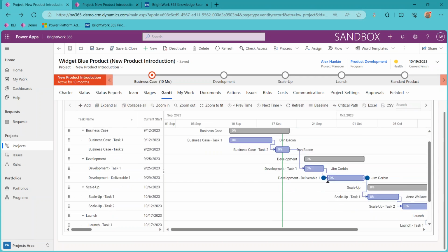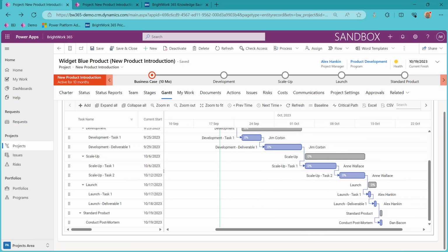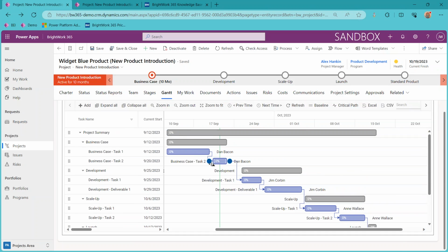It's just as easy as grabbing onto, let me see if I have a sample down here. Well, we would just grab onto one of those circles there and just drag it onto, depending on the type of dependency you're creating, but if it's a finish to start dependency, we just grab onto that circle and drag it onto the leftmost circle of the next task.